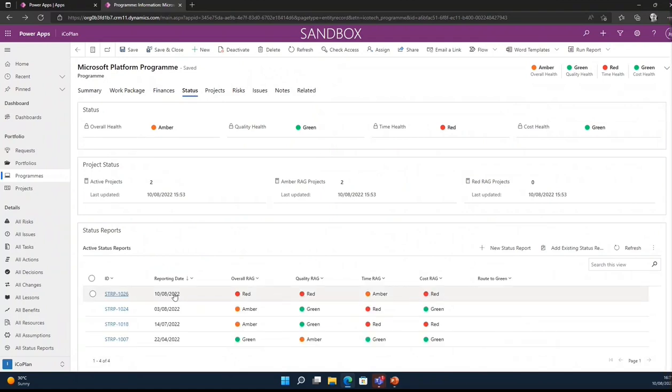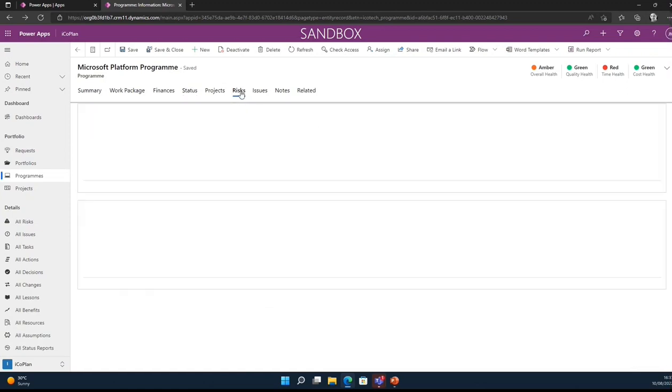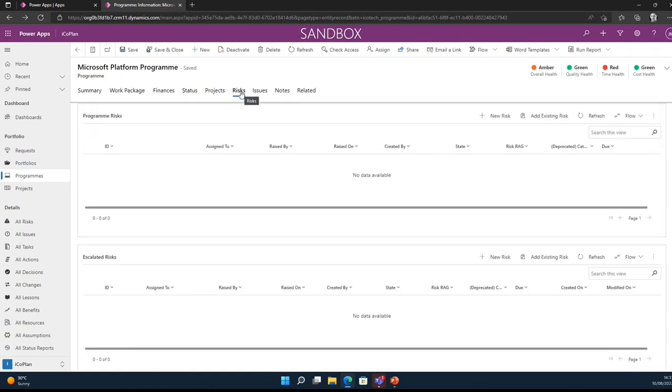All right, the program here. Now, what we could do is projects all have status reports as well, and they all come up in this view. Every status report for program or project gets into one data source and one data table, and then we can see the trend over time. As you can see here, you can see the trend moving over time. That's really important for us, as those things are standard records. They're not an extract, it's an input, and then we're able to do things with that in the future as well, like taking it out in Power BI or wherever it might be.